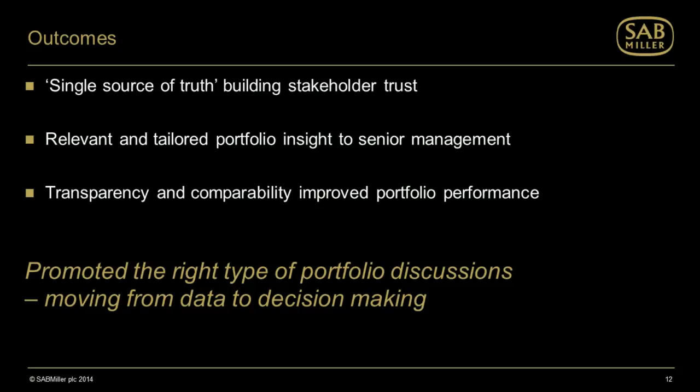Following its launch, we managed to shift the conversations from the quality of data to start making effective and informed decisions. At the leadership level, the first dashboard that you saw highlighting our top 20 initiatives led to constructive conversations and the subsequent cancellation and reduction of the overall budget, saving around $10 million. We effectively moved from providing data and reports to being a trusted partner to the leadership team to make necessary decisions on the project portfolio.